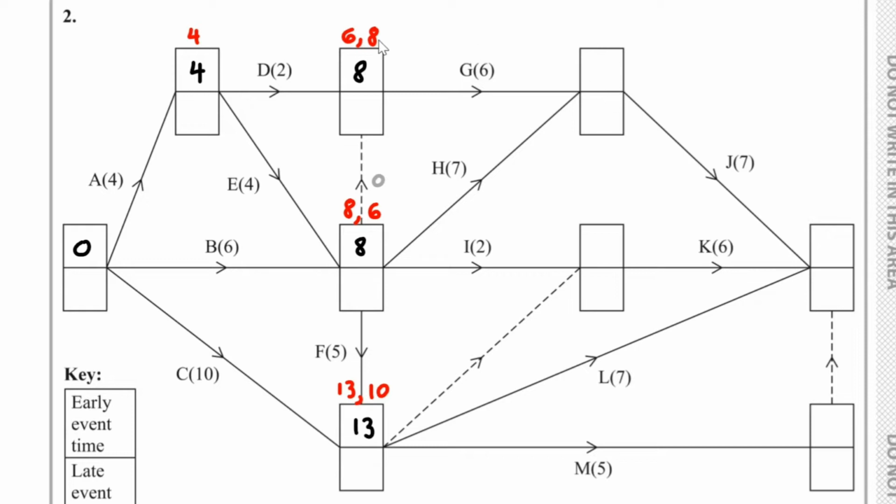Now here we have 8 plus the 6, which is 14, or we have 8 plus the 7, which is 15. The larger one goes in, 15 goes here.